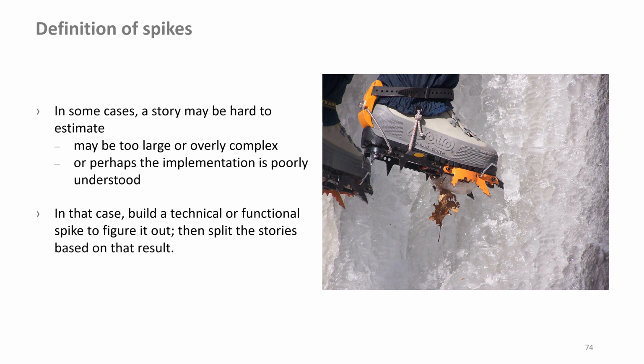Acceptance criteria for spikes. Like any other ordinary user story, they must meet certain criteria to be given the status of done. Ensure that by doing so, the spike is estimable, demonstrable, and acceptable. Estimable. Spikes are stored in the backlog like ordinary user stories, made estimable and sized to fit into a sprint.